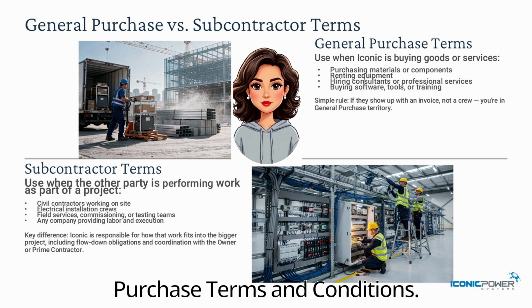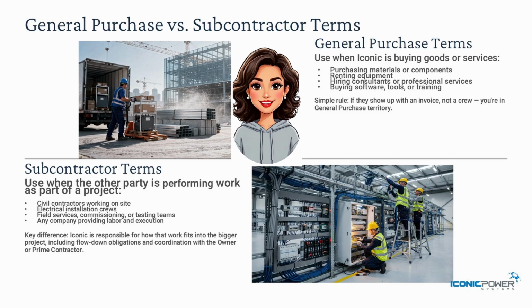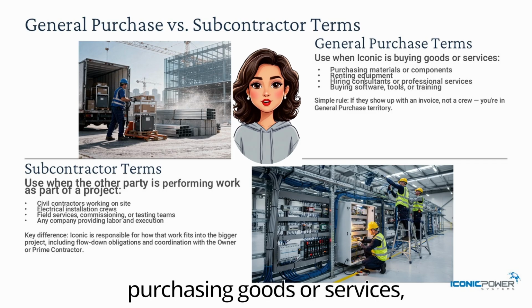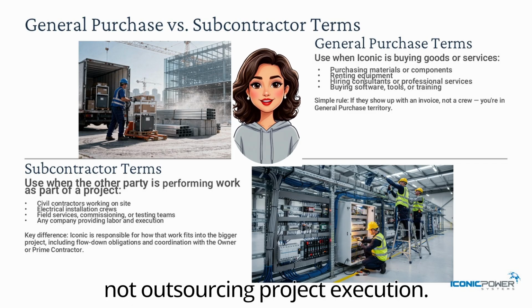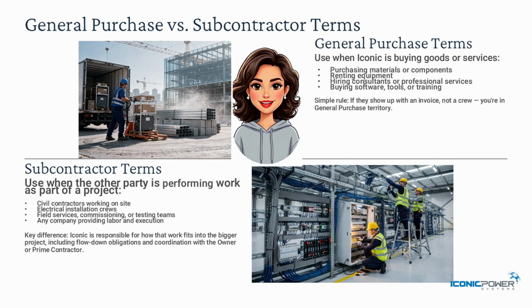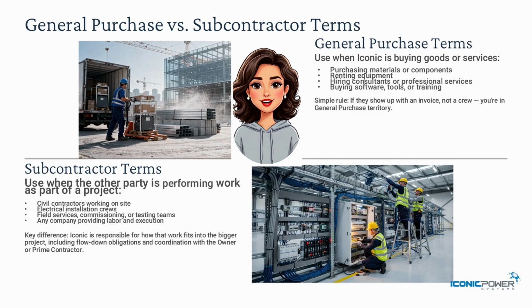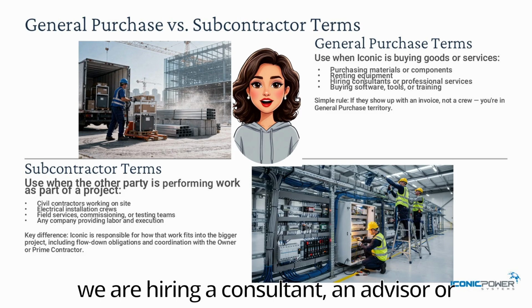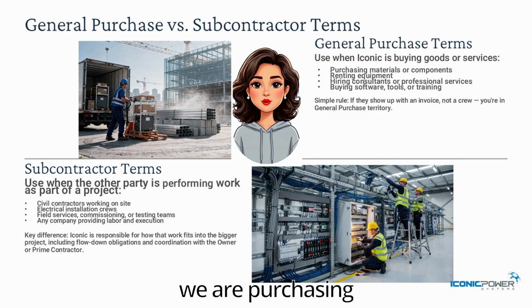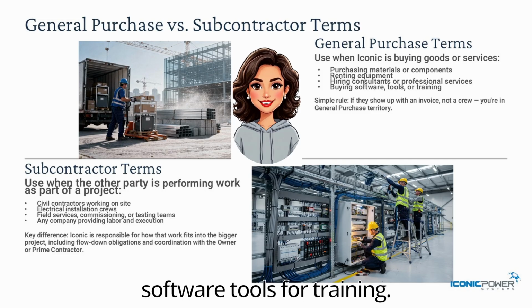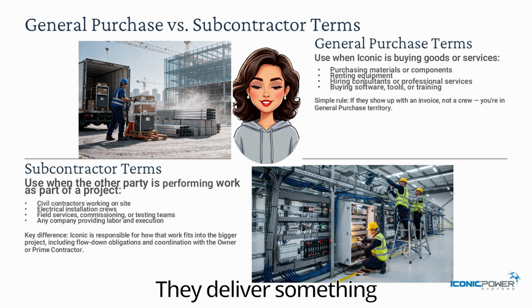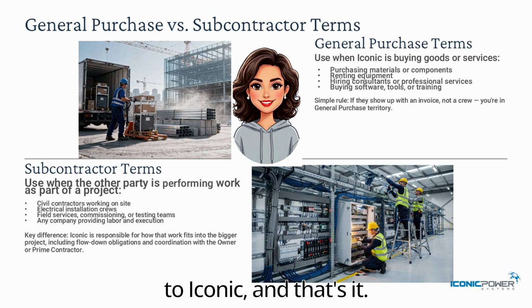Let's start with general purchase terms and conditions. You use these when Iconic is acting as a buyer, meaning we're purchasing goods or services, not outsourcing project execution. Think of situations like we are buying materials or components, we are renting equipment, we are hiring a consultant, an advisor, or a professional service, we're purchasing software, tools, or training. In those cases, the other party is a vendor. They deliver something to Iconic, and that's it.